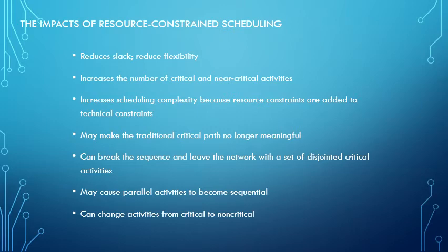It may make traditional critical path no longer meaningful. So we knew what our critical path was before based on what timing we thought we would take, but now that we've done these things, that path is not the critical path. We have to look for what the new one is and really focus on those activities.